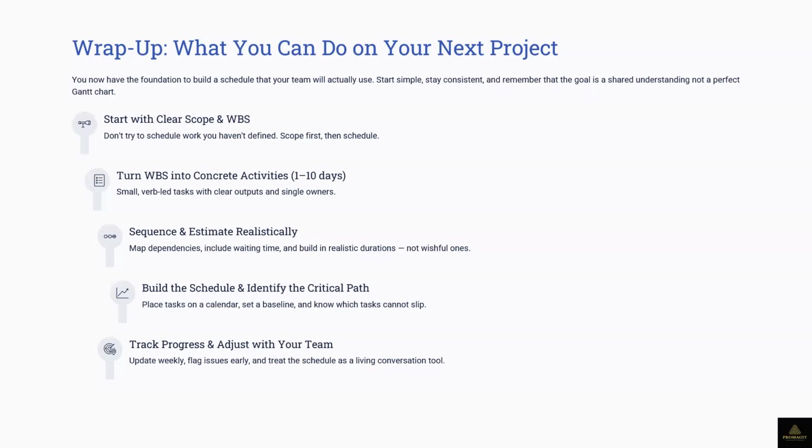Okay, so basically, your scheduler is taking information from you. Your scheduler is going to be taking information from the project manager in terms of resources, because you are the one telling the scheduler the resources that are available. The scheduler can work out different scenarios for you. If we need to finish this project at a particular date, the scheduler can work out, okay, for us to finish on this date, you need this. You can put this resource here, and that resource there. So it can advise you based on the schedule. You will load the schedule with resources and it will advise you as a project manager.